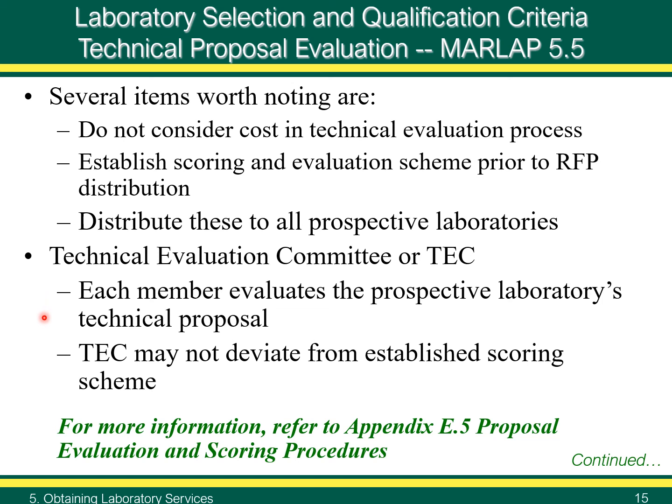A chairperson is designated to provide oversight of the evaluation process. The TEC scores the technical portion of each proposal according to the evaluation scheme established. The committee may not deviate from the established scoring scheme. Rather, each member should evaluate the prospective laboratory technical proposal. For more information on the process, refer to Appendix E.5, Proposal Evaluation and Scoring Procedures.